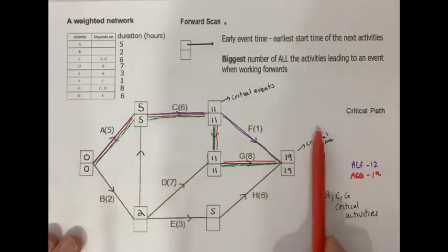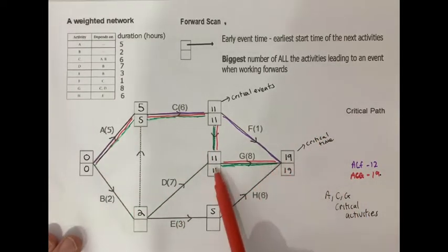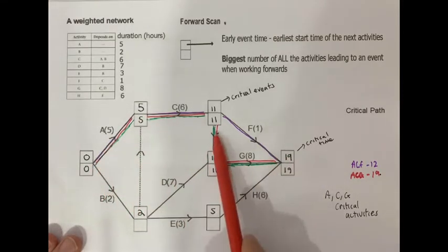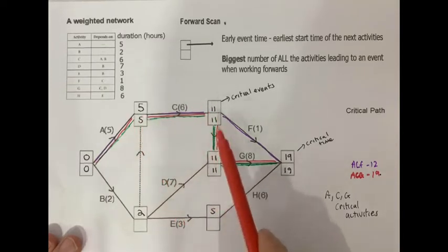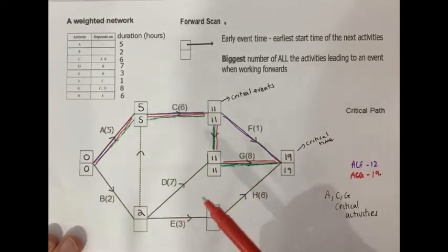So you do the forward scan, work out your critical path by going backwards, no gaps in your subtractions, then fill in all the bottom numbers along that critical path, top and bottom are the same, and that's knocked out most of the numbers on your backward scan, because backward scan is harder than the forward scan, so it'll save you a lot of time.